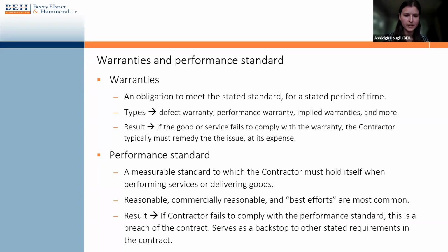And then finally, you have best efforts, which means that the contractor must go above and beyond to complete the performance. Courts have held that even best efforts can require extra expenditure of funds. It's the highest standard that you can have in a contract. The result of one of these performance standards is that if a contractor fails to comply with that performance standard, it's considered a breach of the contract. So it serves as a backstop to all other stated requirements throughout the contract. It's a little bit harder to prove because, again, you're trying to prove this more nebulous concept of a standard, but it is an important backstop to include regardless.